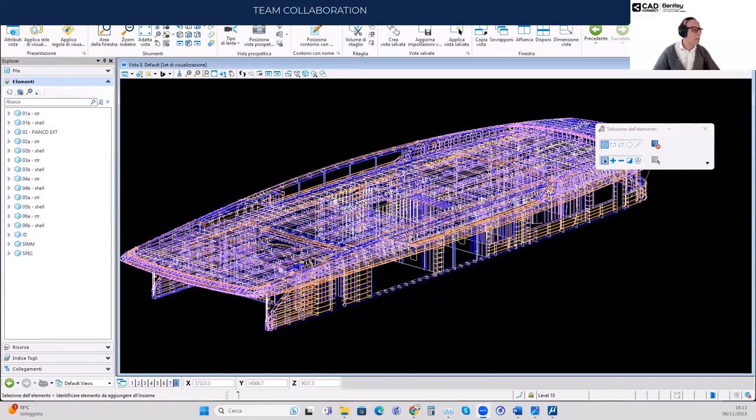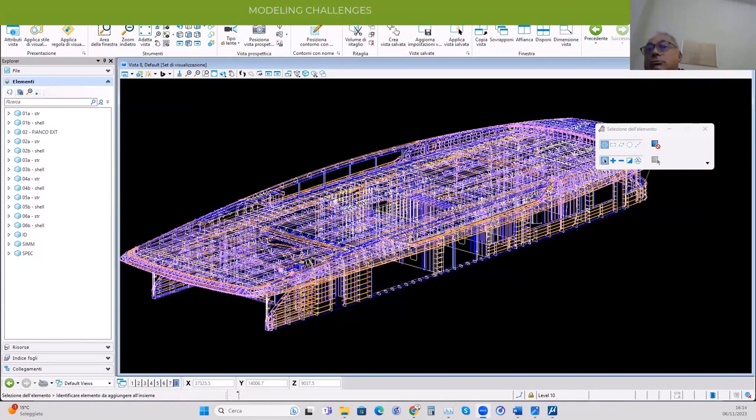Each project has its own degree of difficulty. Some might be simpler, others more complicated. What are the main requirements to be competitive in your sector? Okay, so now it becomes difficult precisely because there is no time and we are eternally late. You could say, unfortunately, the shipyard always estimates a start of work that it cannot respect, but it never changes the delivery time. So we always start late, we improvise.